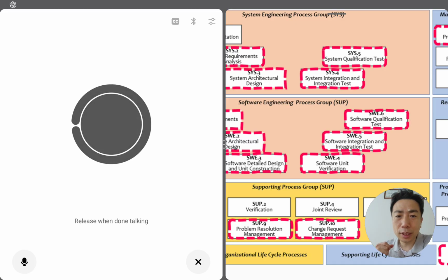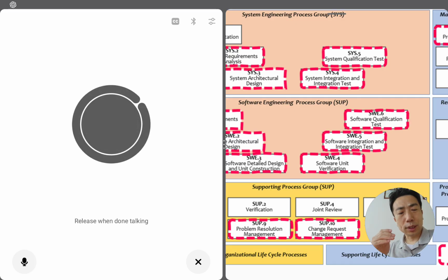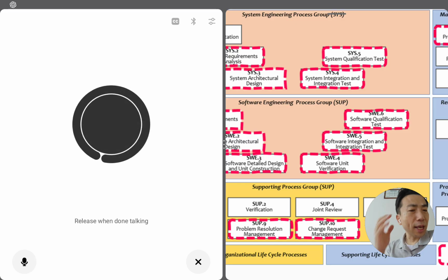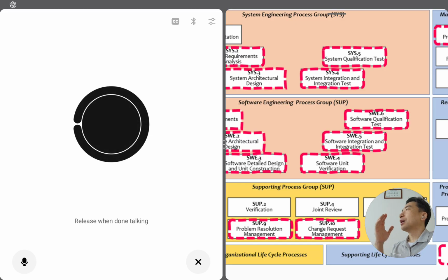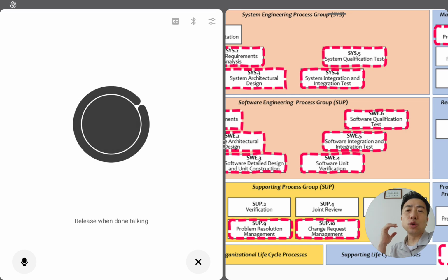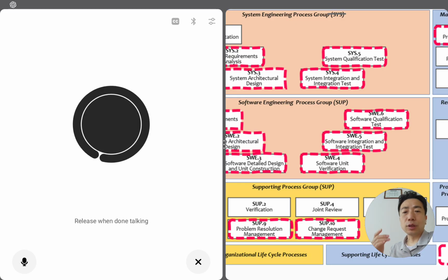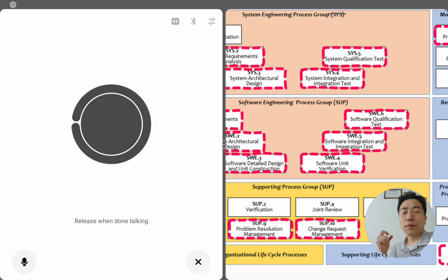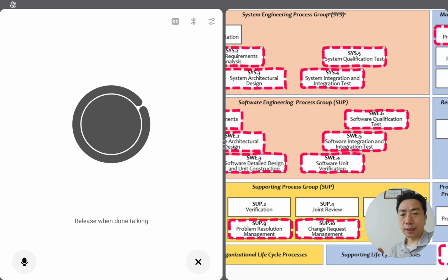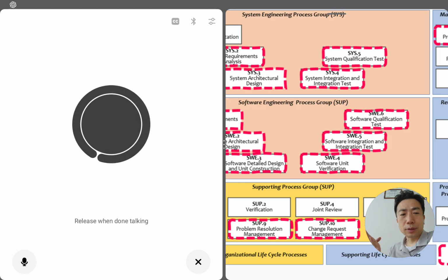Open means the change is logged. The word open means the change is logged. In process means someone's working on it. Resolved means the fix is done and verified. Closed means it's fully approved and archived.